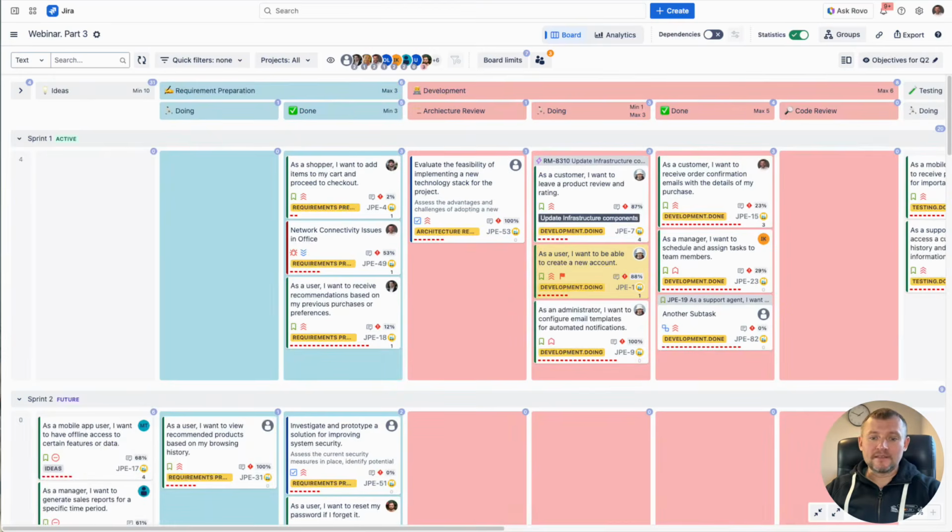With your board in place, you can gain ultimate visibility and begin optimizing your flow. And the first enemy of the flow efficiency is obviously too much work in progress, so we can start with limiting it. WIP limits can be applied at various levels: column group, intersection of column and swim lane, intersection of column group and swim lane. You can also set personal WIP limits to quickly identify overloaded or idle team members.